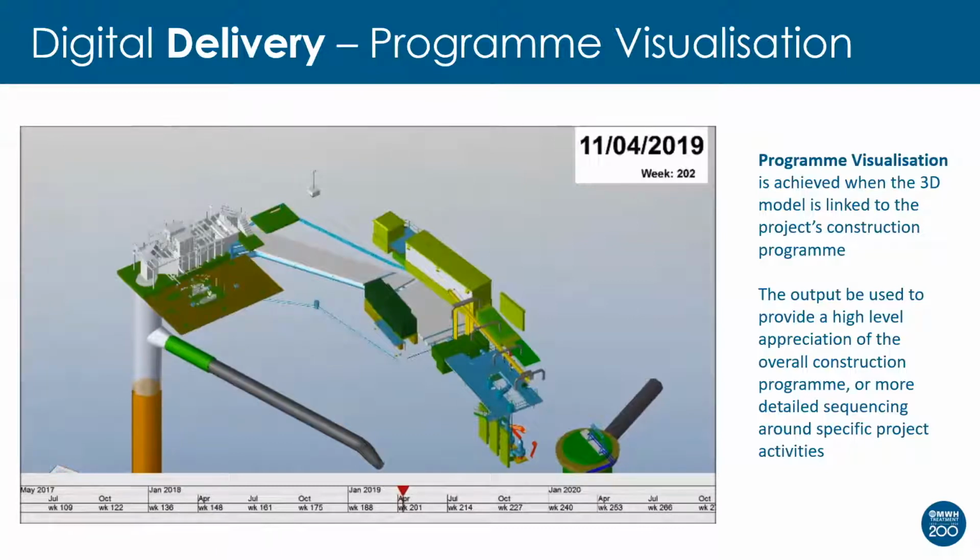The interesting thing for me on this particular one was when the CAD engineer sat with the project planner and they linked the two together, the planner said, that's not right, that shouldn't happen like that, thinking that there was something wrong with the model, and it was actually the P6 program that was wrong, and there was just one small sequence that he hadn't been able to visualize across the multiple pages of the schedule, and straight away that was corrected.